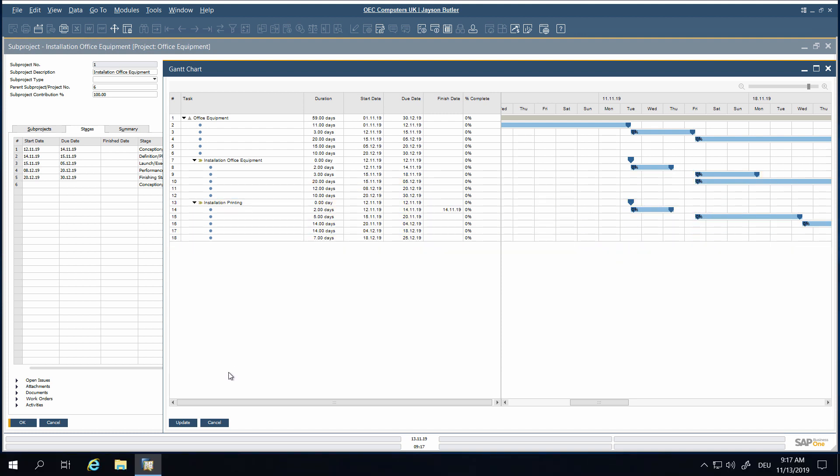When updating the Gantt chart, all changes are updated accordingly in each related project stage.